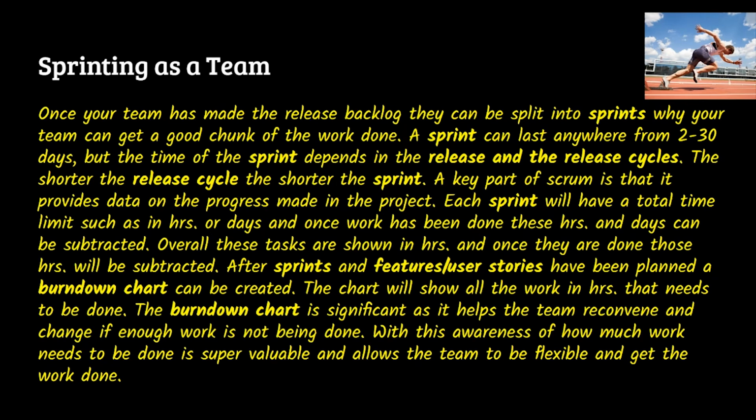Now, a sprint, as said before, is a short time where you get a good amount of the work done. They can last anywhere from 2 to 30 days, but the time of the sprint depends on the release and release cycle. Your release should be a good indicator for you getting a good amount of the work done. So one of the releases might be getting stuff done before the first tournament. And you want to put the sprints according to however long your release is.